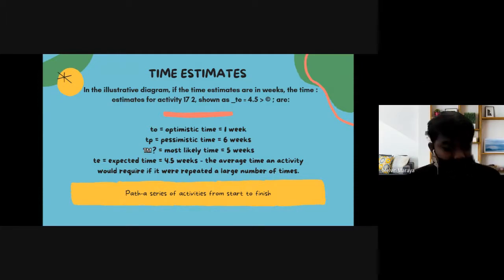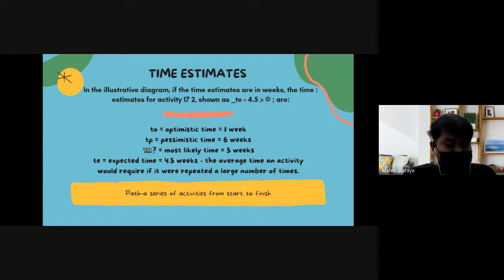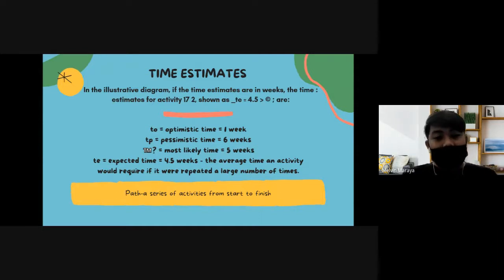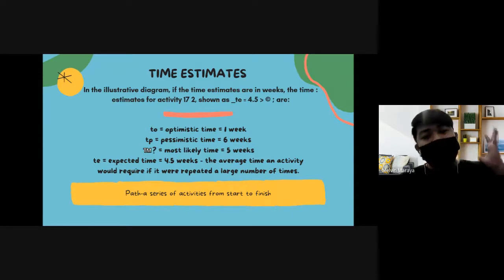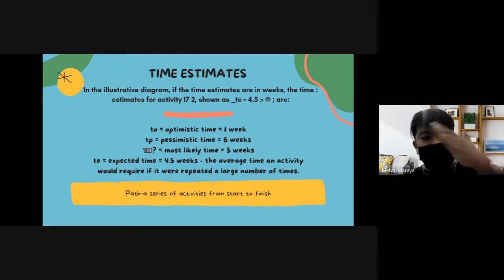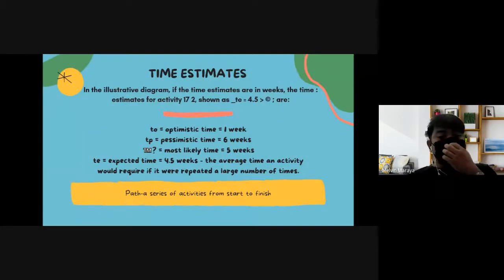Most likely time is the highest probable time. If optimistic is the shortest time, and pessimistic is the longest time, then most likely time is the time you are most certain about — for example, if you know it won't finish in one week but won't take six weeks either, then it will most likely finish at around five weeks. That is the most likely time.